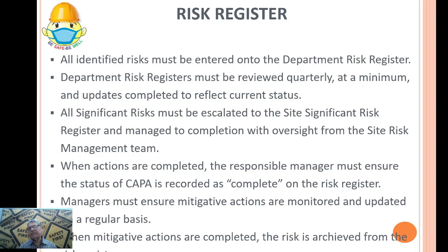When mitigative actions are completed, the risk is archived from the risk register. So that is removed, or there may be some remark that now this risk is not part of the risk register as it is being completed. It is called archiving of the risk.